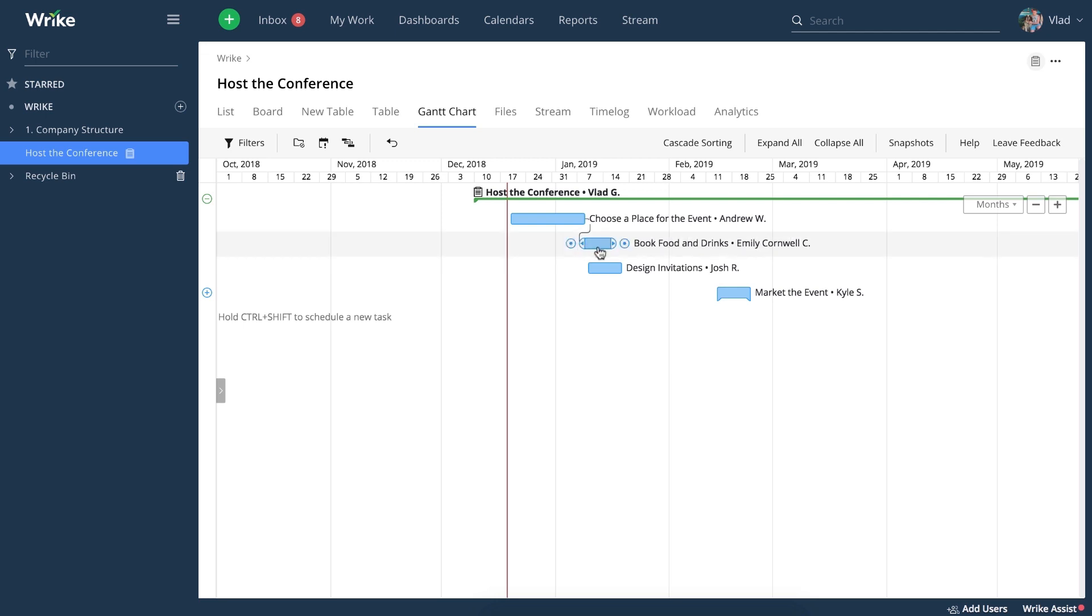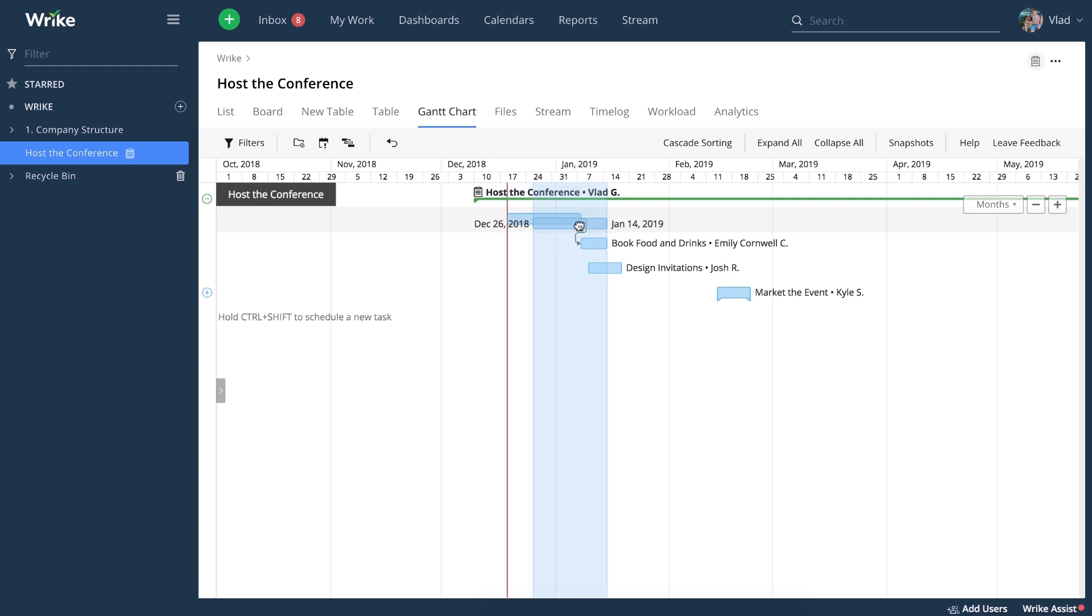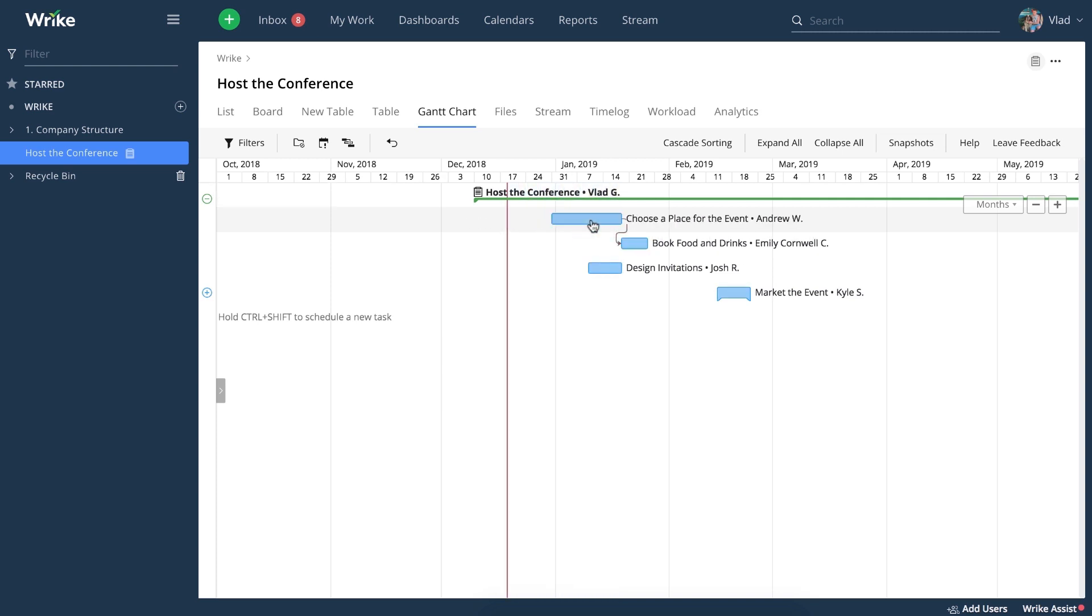If you need to reschedule dependencies, you can reschedule entire dependency chains in one go using drag and drop.